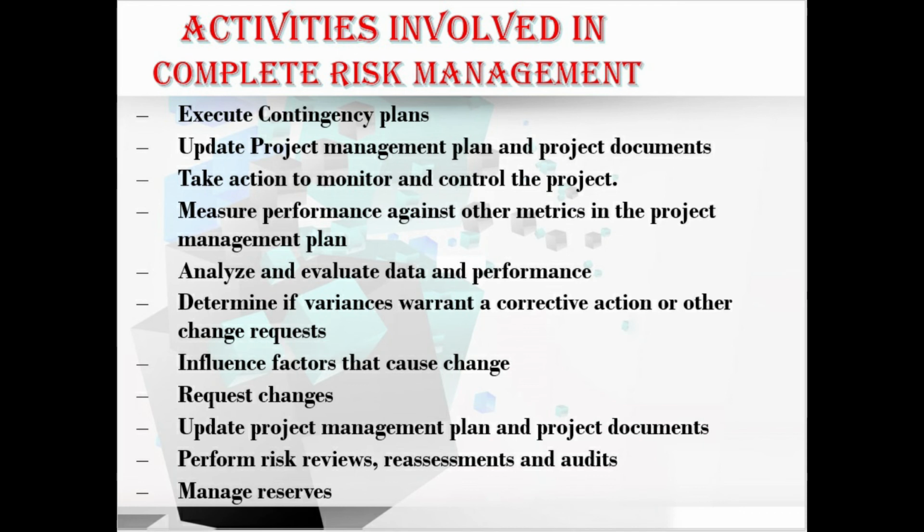And the next is we need to take action to monitor and control the project. And we need to measure the performance against the metrics in the project management plan. And next we need to analyze and evaluate the data and performance. And we need to determine if the variances warrant a corrective action or another change request. And next we need to influence the factors that cause a change. And the next step, we need to request the changes. And the next step, we need to update the project management plan and the project documents.